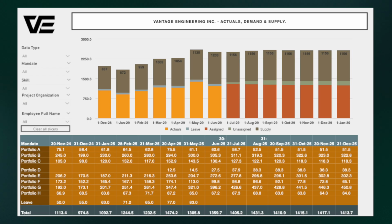So apart from just the API, we also built in charges from Oracle, which is where our timesheets are kept. In an organization like ours, we bill to clients, right? Every hour that we bill a client, that's where we get paid. So if I was assigned to a particular project, I had to be charging to that project. But sometimes those things are not true. I might be assigned somewhere, but charging in a completely different spot because I have some extra work to wrap up that I never got a chance to. So we would be able to see month over month the changes of charges, which we call our actuals, compared to what our forecast was.